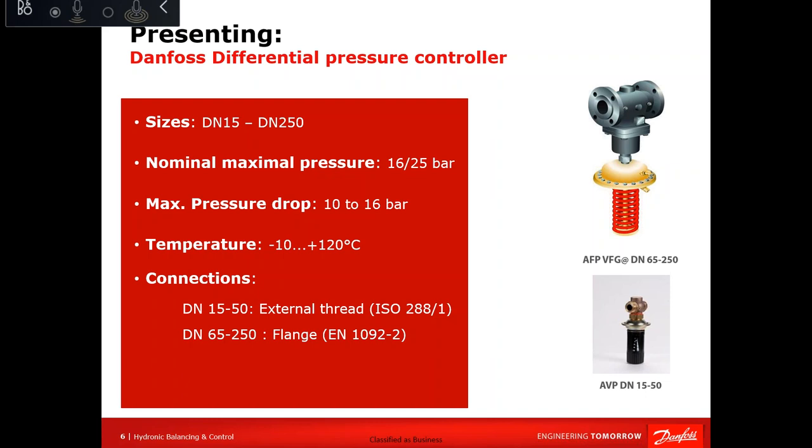Okay. In case of installing DPCV at the beginning, if the chilled water riser serves multiple stories, a multi-riser building, will it be sufficient for riser balancing at both modes, full load and part load, or is it going to be better than using DRV? For sure, using DPCV will be better in every aspect, for balancing, for commissioning, everything, because with DRV you are doing proportional balancing. You need to visit every single part, branch, and sub-branch to have the total balancing.